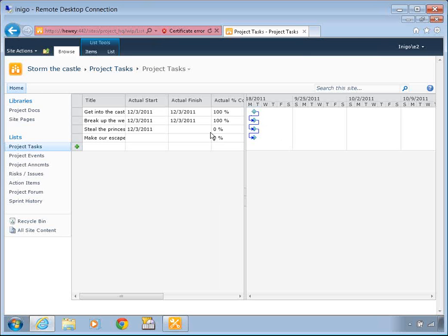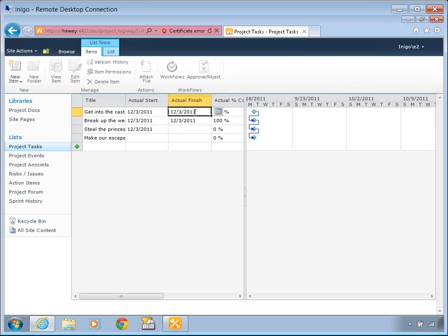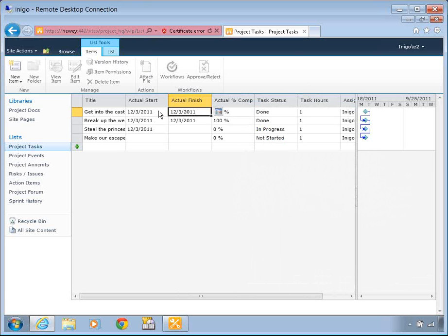And a Gantt chart shows us a grid on the left where we can actually make edits to the records that are in play. And we also have a chart on the right that shows this against a calendar grid that helps us to see things visually, including such things as predecessor relationships. Now you'll notice in my grid over on the left, I've configured this view so that we have the actual values. The usage scenario for this would be that the task list has already been created. This is the place where I can do my tracking of things as they occur.